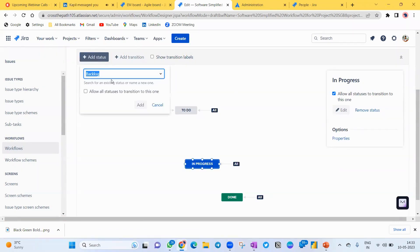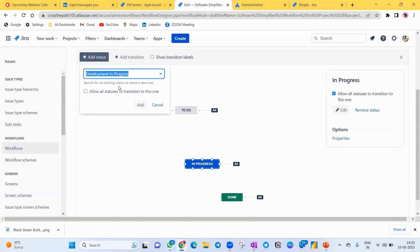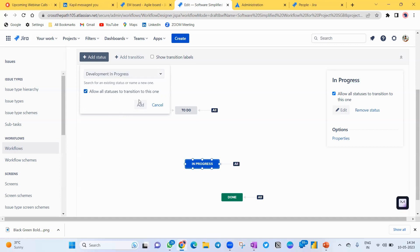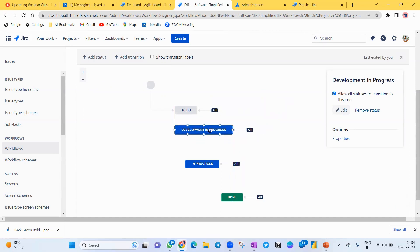Click 'Add Status' to add a new column. Give it a meaningful name — for example, 'Development In Progress', so any task where development has started can go here. There's an option: 'Allow all stages to transition to this one.' This means, for example, if a story is in Testing and a bug comes up, it can go back to the Development column. If you're new to Jira board configuration, as a Scrum Master always select 'All' so stories can move from any stage to Development In Progress.